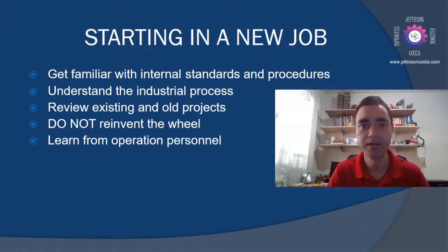And if we are only in the design department, that kind of situation doesn't return to us, and that's why in many companies we have the lessons learned. That is a way to share with everyone what kind of issues were found during the commissioning, the startup, and the production of the plant, in order to avoid this kind of situation.